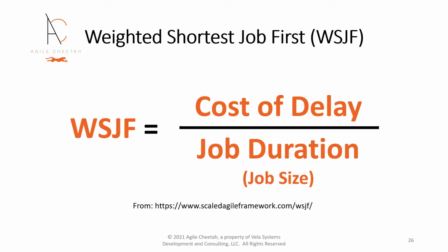SAFe's model substitutes job duration with job size, which is much more easily determined through agile relative size estimation techniques, such as planning poker. Relative sizing is faster to do, more intuitive, and becomes increasingly more accurate the more we practice it than estimating in hours.